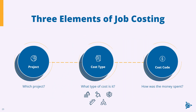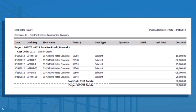In summary, while you may see cost types as project expenses on an income statement run at the end of an accounting period, the job cost report focuses on specific jobs and provides a deeper level of detail. Also, instead of being run only at the end of a financial period, the job cost report is generated throughout a project's duration to provide visibility and proactive control over costs and progress. In a detailed job cost report, you can see all three elements of job costing at work: the project, the cost code, and the cost type. So when a construction owner says, 'I want to know how much money we spent on slab-on-grade during March on the Paradise Road project,' you can run job cost reports pulling transactions from the job cost ledger to get the detail project managers need to make good decisions.